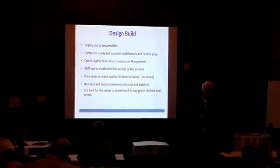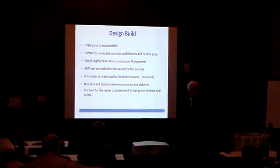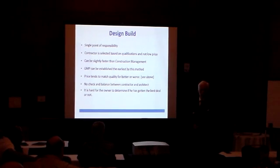You don't have to worry about contracting with the architect that way, but you still can have a lot of input to your design. And our RFPs require that, for the rectories, for example, that they come up with an initial design. So design builders have to do a lot of work at RFP time. They're coming up with initial concepts for your building, kind of the GMP price for your building before you ever hire them.